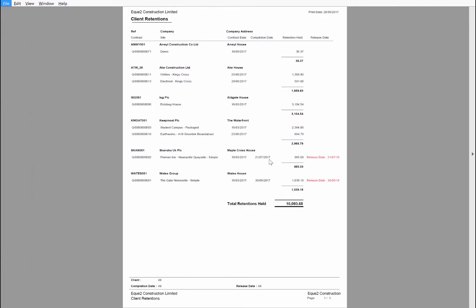And if the project has a completion date, it will use the completion date and the held for period or defect period to calculate a release date for each individual retention.